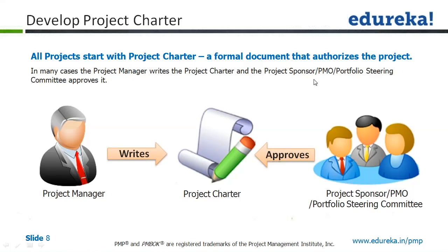The project charter formally authorizes the existence of the project by the sponsor or by the PMO or by the portfolio steering committee. That is one. The second is the charter authorizes the project manager to apply organizational resources to the project activities. You got it?